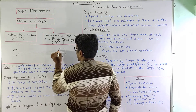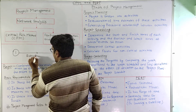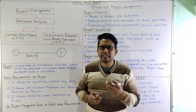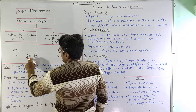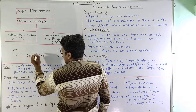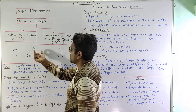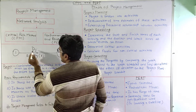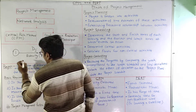The first term we are going to encounter is activity. An activity is a physically identified part of a project which requires time and resources for its execution. An activity is represented by an arrow. Any activity X is represented by this arrow, and this activity consumes DIJ time, cost, or distance. We assume that activity X is represented by an arrow sign and it consumes time DIJ, where I and J are known as events.